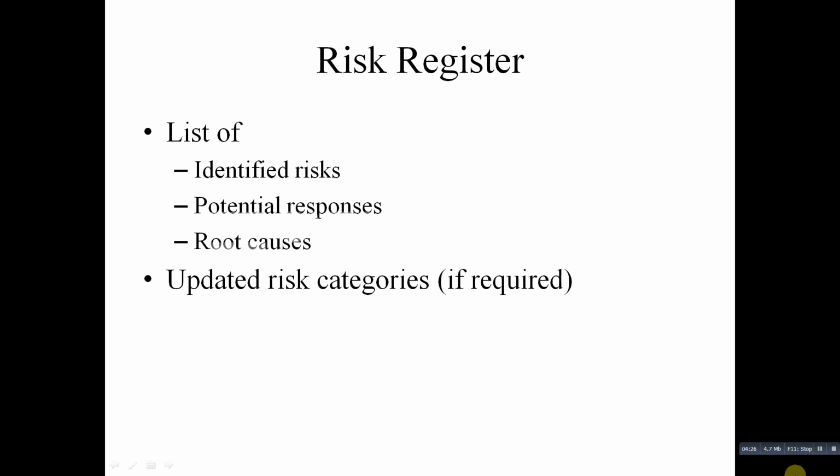Then the last thing to be considered for the risk register is the status of the risk. Did the risk event occur? Was the response strategy completed? Is the risk no longer relevant to the project? Likewise, these are questions you have to ask and mention all the relevant information related to this. So this is what the risk register is.